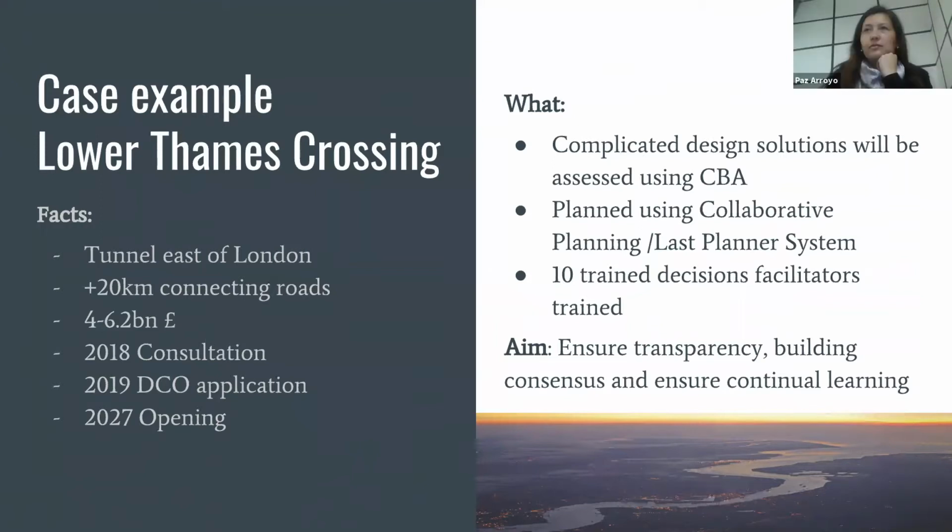What we also decided to do was to use the last planner system to plan out these decisions. We have a lot of different design decisions circling around, and they all impact each other, which was quite difficult to figure out how to deal with. But last planner is a brilliant tool to do that. Coming back to one of your principles you discussed, Annette, you have to train and actually learn to make decisions. It quite soon became clear that we needed trained facilitators to be able to help and guide these decision processes when they're so complex and we get such big groups together.